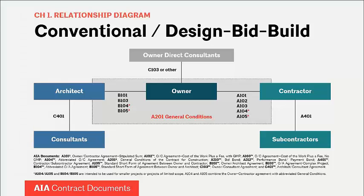Let's look at the relationship between the project's parties and how the General Conditions ties into the other agreements for a project. In traditional design-bid-build project delivery — what AIA calls conventional delivery — the owner selects the architect first to design the project and produce construction documents, then solicits bids to select the contractor. The A-201, the gray rectangle in the middle of the slide, provides the general conditions that define and coordinate the roles, responsibilities, relationships, and risk allocation between the owner, architect, and contractor — the rules of engagement for the project.